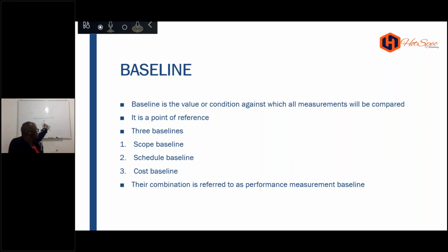It looks like that. But as I go on around the project, I'm telling you something like this is going to happen. You see that blue line? It's going to be turning like that, going out of line. So you're going to see a lot of deviations in your plan as against the baseline, which is the green. And that's what helps you to monitor, to keep track. Without that, you won't know something is going on. And that's the truth, MS Project will do all that for you.